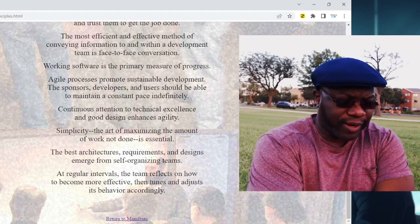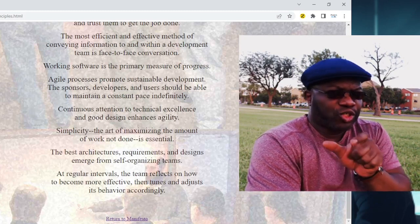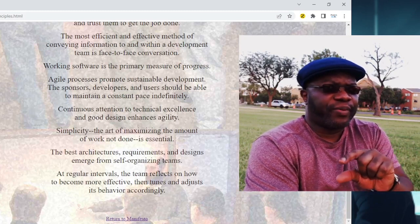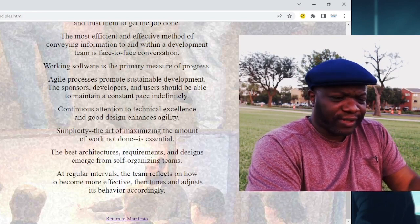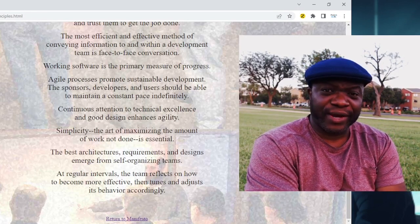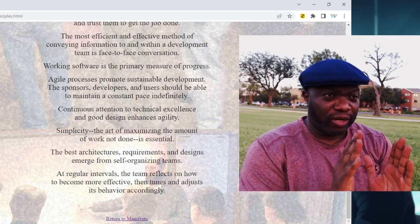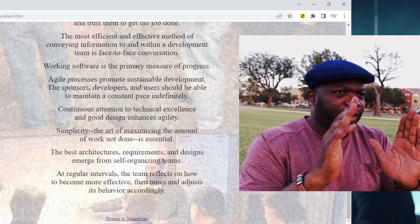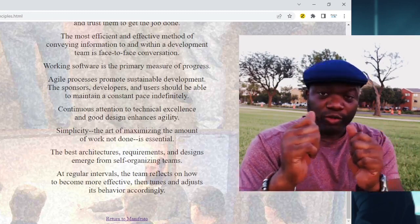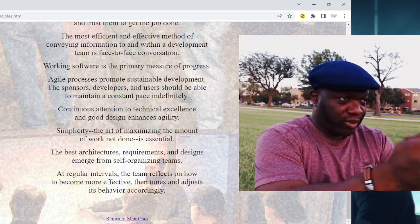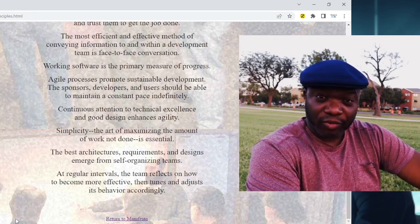Number seven: working product is the primary measure of progress. In the world of Agile, we do things in short bursts, and a primary measure of progress is not a Gantt chart or a histogram — it's a working product. If you're done, you're done. You're given a two-week window, three-week, four-week — whatever that short window is. At the end, you either have a working product or you don't. If you do, that's progress. If you don't, a primary measure of progress says you've got ways to go.